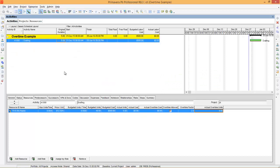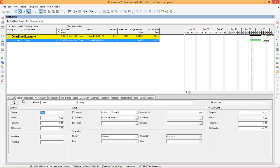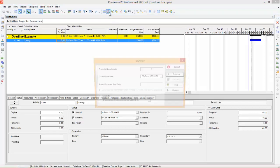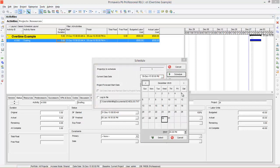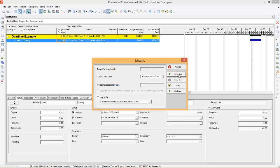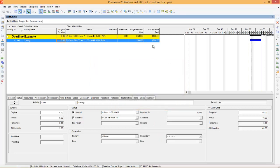Now let's say we have started this activity. Go to Status and say it is started — it is started on 31st December. Now let's say this activity has completed on 5th January 2016. You can say finished, go to Schedule, and say it is finished on 5th January 2016 at 5pm. Now schedule it — so this activity is completed. The program has calculated the actual labor cost as $500.